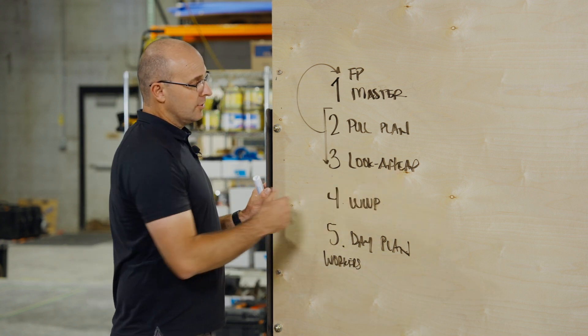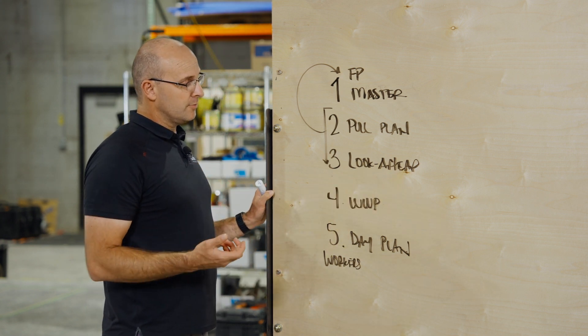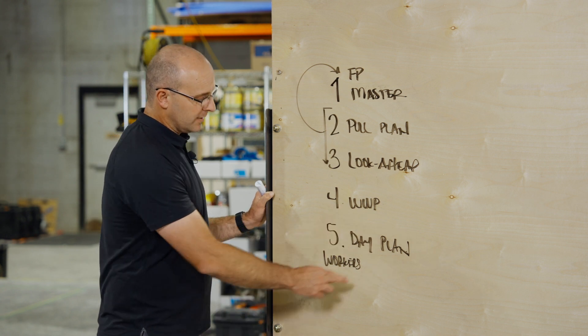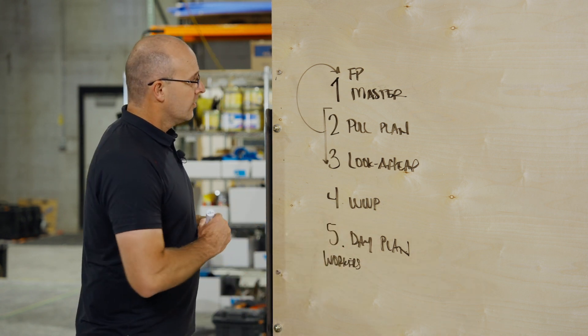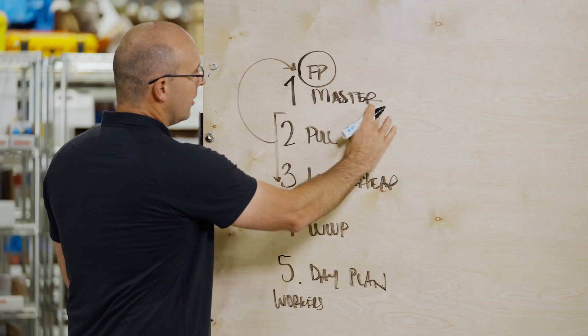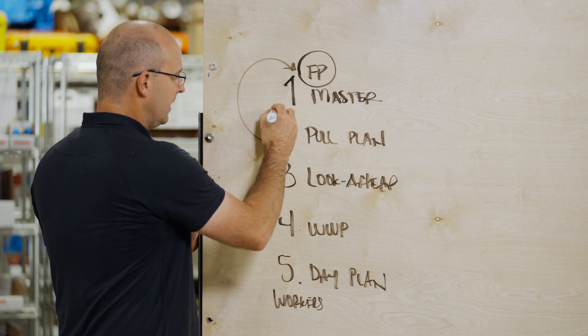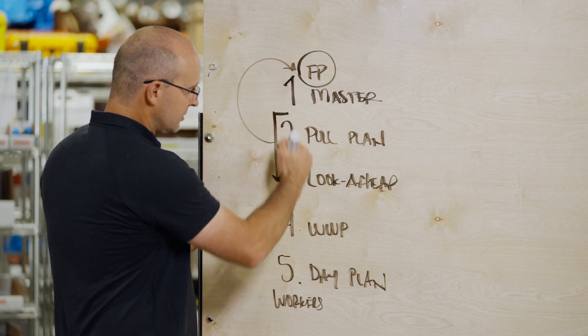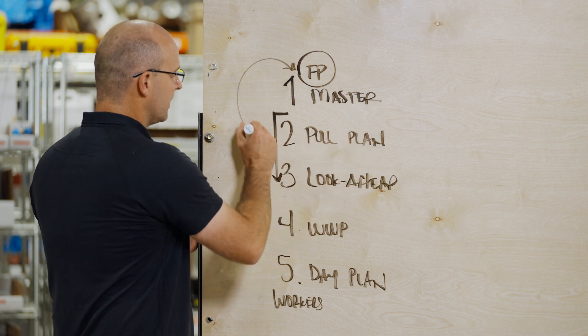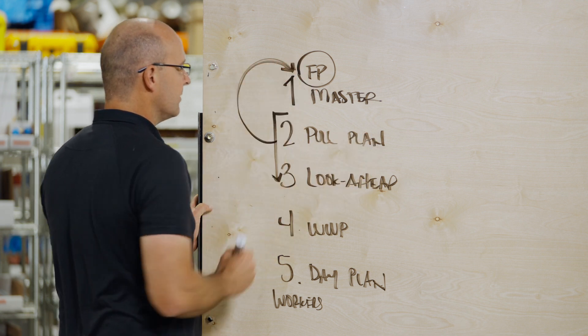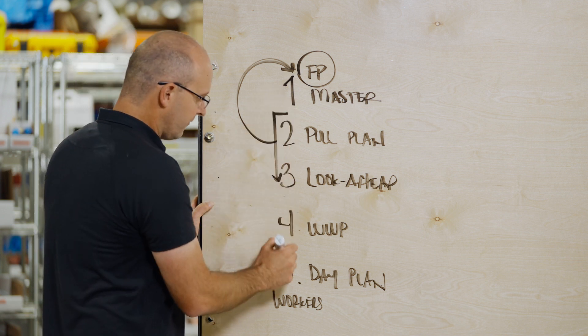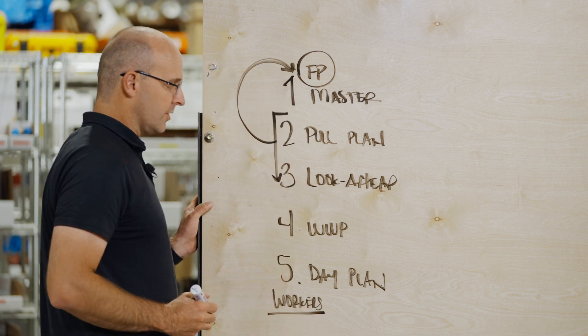Then your look ahead plan. Your look ahead will make sure that you're making work ready and allow you to remove roadblocks. Then your weekly work plan and your day plan. So right here, I've listed FP. Your first planners are involved with the master schedule. From here on down, this is your last planner involvement. Once you create those pull plans, that educates those sequences in your master schedule. And this one, two, three, four, five gets the information all the way to the workers.